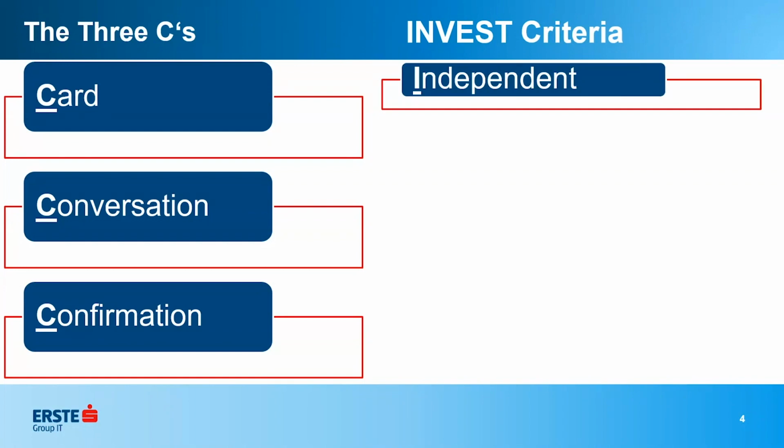So we all know stories should be independent. When you're writing a story, if you're seeing dependencies, you should do whatever you can to remove those dependencies if at all possible. Of course, I live in the same real world you guys do, so I know that's not always possible, but every effort should be made to have the stories independent. If it's not possible, or it's going to be so time consuming to remove the dependency, just make sure the entire team is aware of that dependency and put it in Jira so that anyone else looking at your stories also knows about that dependency.